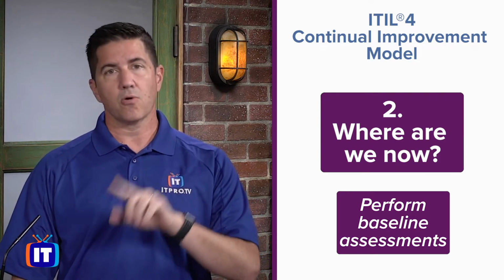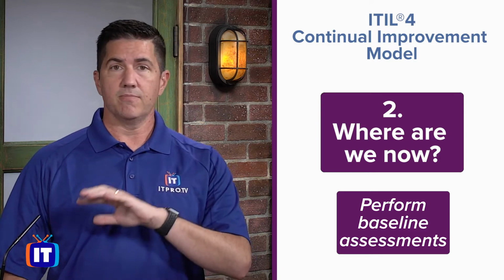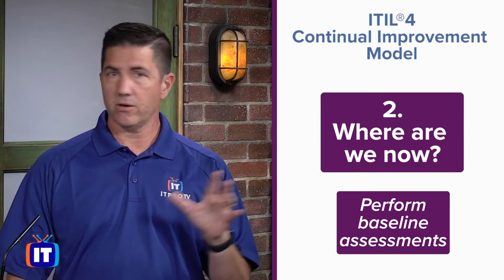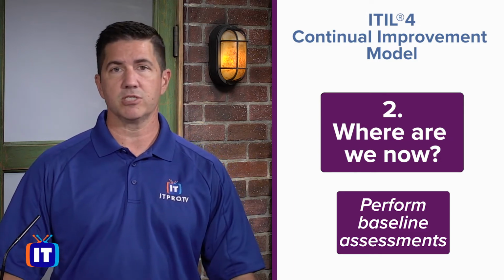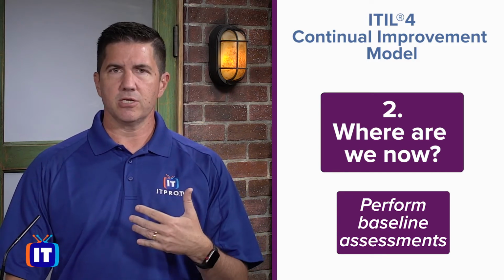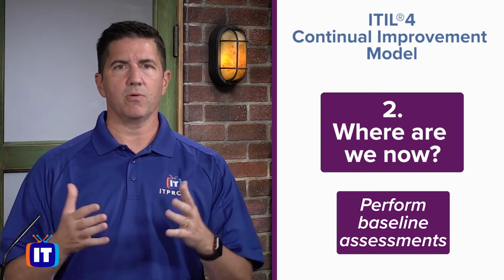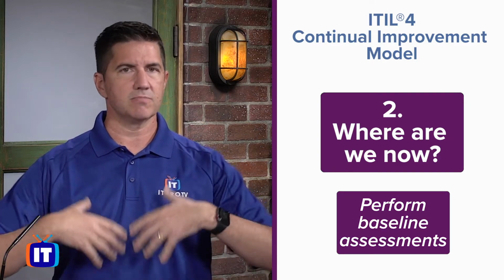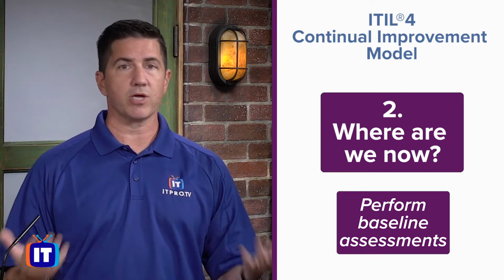Either one, Courtney is already measuring and has metrics on your FCR score at Acme Widget's service desk, but maybe she didn't. Well, that's okay. What she can do is say, all right, well, let's take the next couple of weeks and create a baseline, get some data that we can measure against. Where are we currently at?